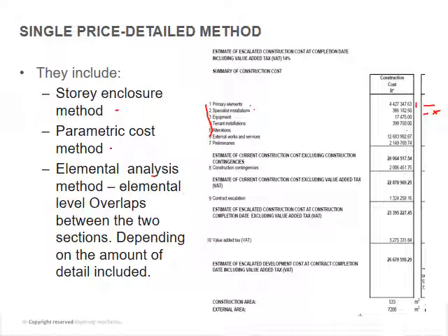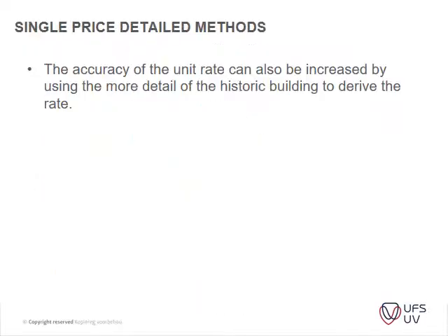You will see you've got your alteration works and your external services also here as extra items. Preliminaries, we'll still get to that. That's basically the contractor's establishment costs and our construction contingencies. Contingencies, we'll also talk about, is very important to note. Usually at this stage of the project, there's still a lot of unforeseen design items that we haven't looked at. So we usually build in a bit of a contingency to make sure that we're covered for that. As the information gets more and more, you can actually lower the percentage of your contingencies.